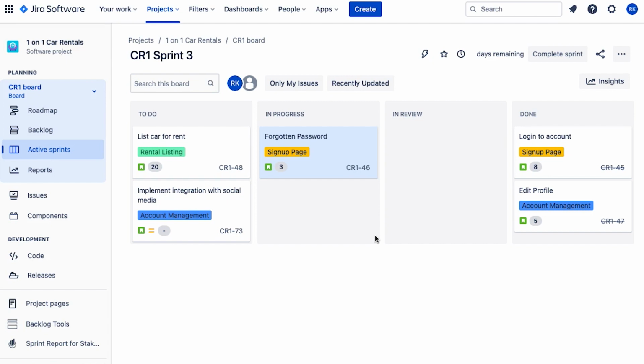So this is where we can leverage Jira. So let's go across to Jira and have a look at what we can use within it at the sprint review session. So at the sprint review session, what we can do is leverage the reporting provided by Jira to guide what is discussed. But before we can use the reporting, we first need to complete the sprint.